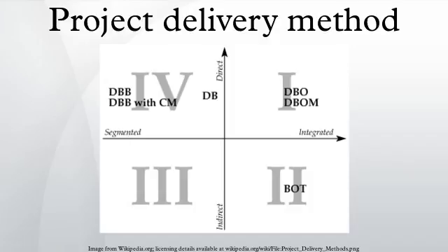Indirect financing risks being mistaken for privatization. Though the providers do have a concession to operate and collect revenue from a facility that they built and financed, the structure itself remains the property of the owner.